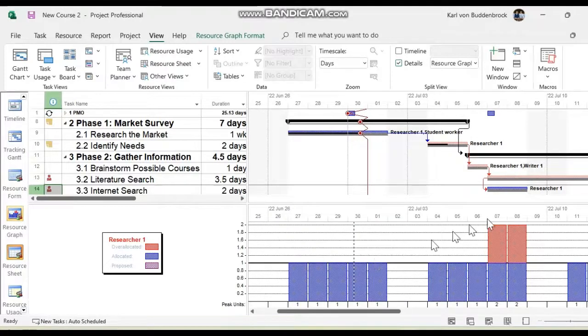There we go. Clearly on the 7th and 8th of July, here's today, this is next week, I am short of 1 unit. So what I'm going to do is the same thing as I did with the other problem for today, which is to throw another resource in.